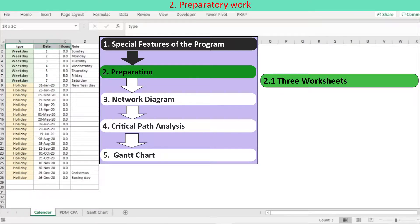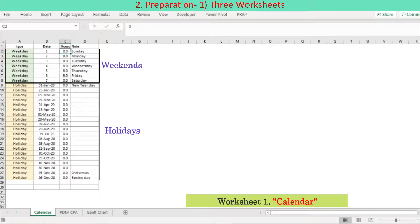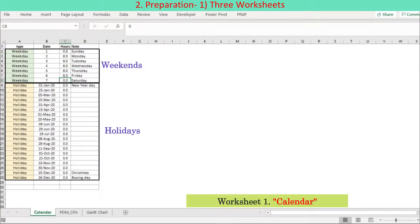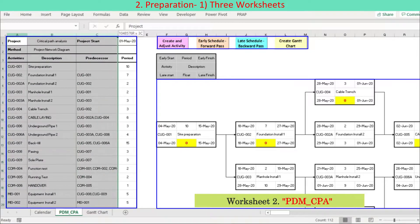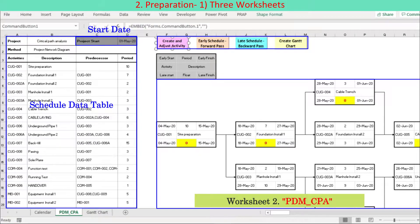As preparatory work, we need to generate three worksheets and define activity schedule data. The first worksheet named Calendar is pre-formatted. It is necessary to define the weekend day and populate bank holidays to do practical CPA rather than virtual. Enter zero hours for the weekend day and complete the project holidays list. The second worksheet named PDMCPA is pre-formatted for activity details, with a range of four columns to describe activity details and project start date.